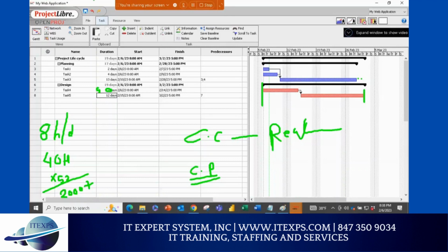So a good project manager, before they talk to the management, how long will it take? So here, please see, how long will it take? They will not use critical path; they will add some buffer activity or dummy activity and create a critical chain. Critical chain means critical path with buffer or dummy activity to make it more realistic. And it is the longest path, right? And that is what you should tell your management: this project will take 19 days, not 17 days, because those 2 days will give you buffer.